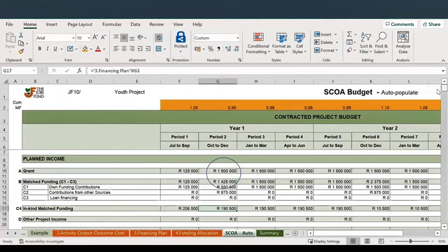It's important to also note that whilst we have these budgeted and we've contracted to pay such amounts, we do check on a quarter-to-quarter basis performance, as I mentioned, for usage of the funds, correct usage of the funds. If there seems to be an accumulation or consistent accumulation of money, as in monies aren't being used, we might say to you, we're not necessarily going to release this 1.5 in this quarter because you don't seem to use it. So I think Mfundo mentioned, and you'll hear it many a time from us, make your budget and your plans as realistic as possible.